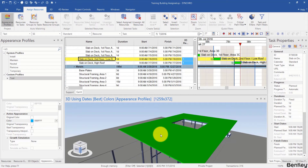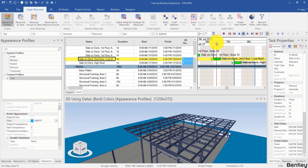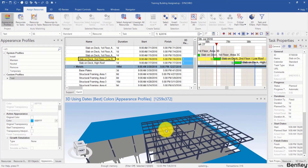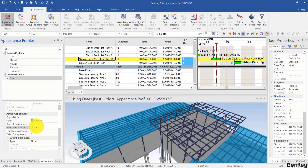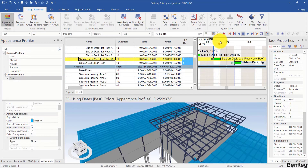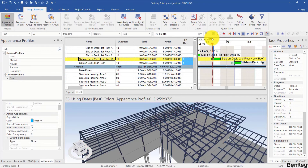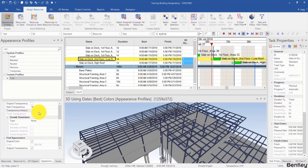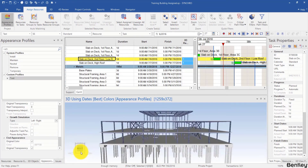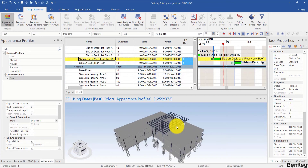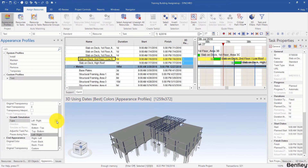The high roof is still using the Install profile, so later we will talk about how to change that. For the low roof, we can give it a transparency. I will check the transparency interpolation and give it a start transparency of 70%. Now when I drag my focus time, the color will gradually change from 70% transparency to totally opaque. I will then uncheck the box and change the start transparency to 0, and give it a growth simulation from left to right. Note that left and right refer to the direction of the visual indicator, so you may need to bring up the visual cube to understand the directions in the growth simulation.